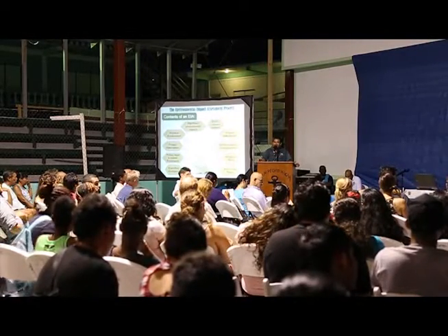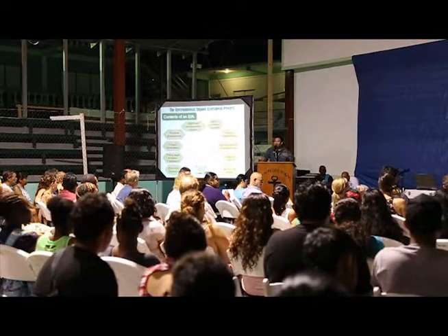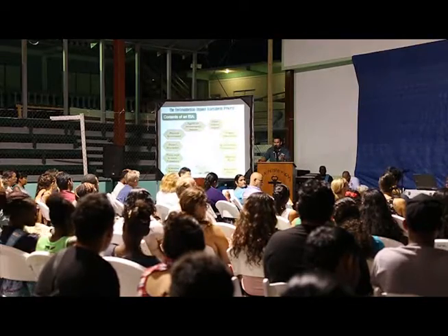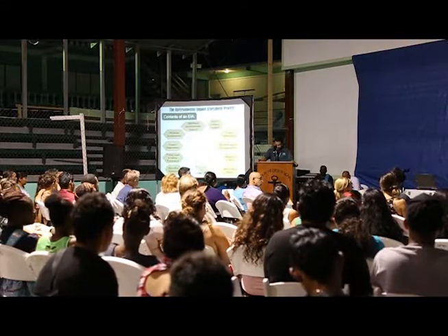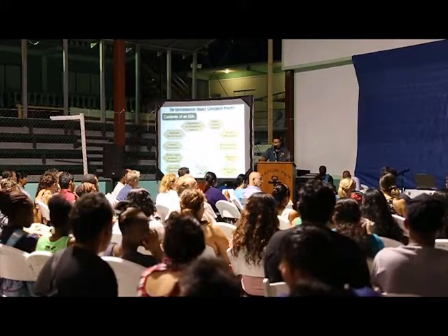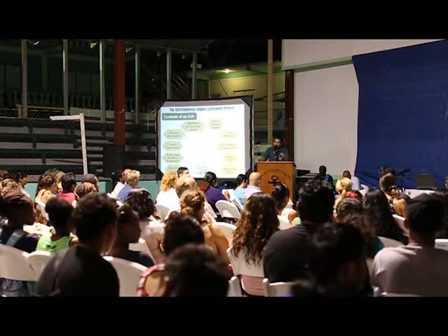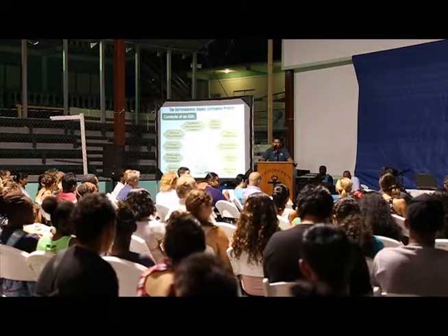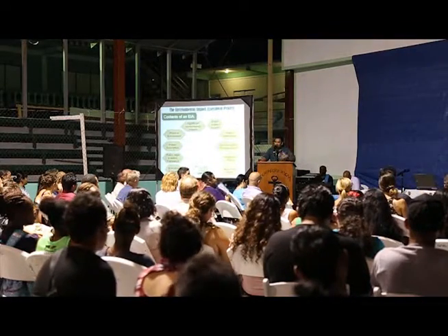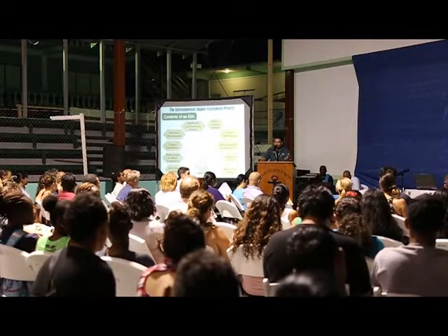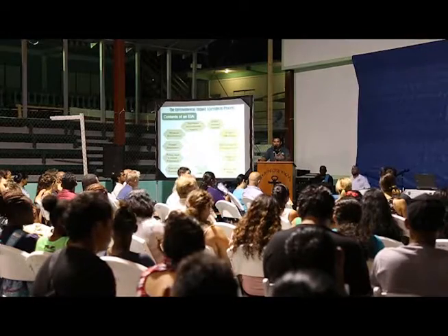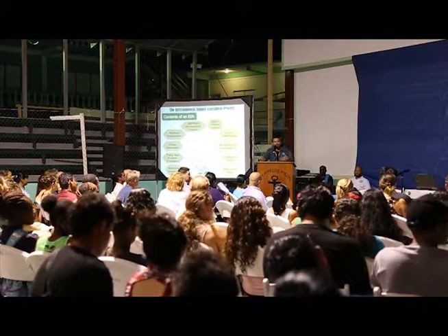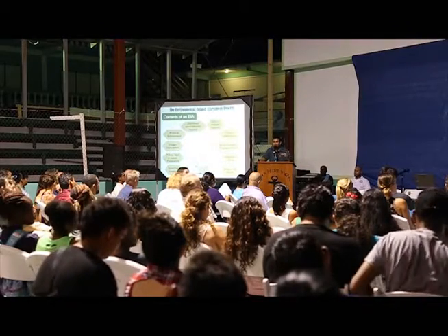For any document to be an EIA as well, it has to have a description of all policies, legal and administrative frameworks that could have relevance to the project. For example, if we know there are to be any piers constructed, which Blackadore does include one or several of those, they have to discuss which legislation addresses the issuance of permits, what is the process in obtaining those permits, so that the general public in reading it would know as well. Because environmental impact assessments are also considered resource documents. You can look at those, they would give you a summary of the legislations.